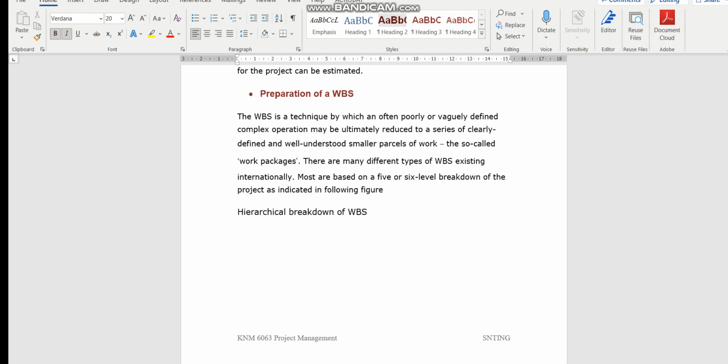So with the work breakdown structure, this is like the end of the road in that sense, of scope management. Once you come to the work breakdown and preparing this work breakdown, normally, like I said, we do not want to be doing more than 3 or 4 layers in the work packages, you see. Other than that, you'll be putting it as the product itself or the component itself.